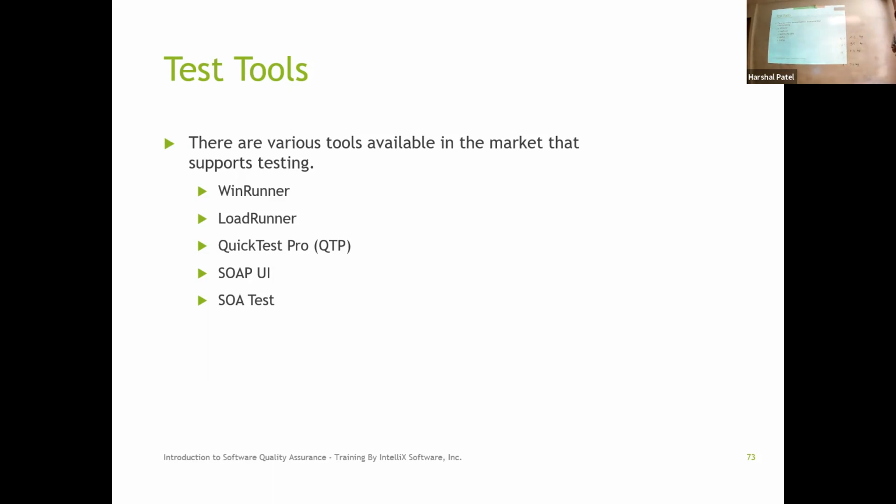Think of it, anytime somebody asks you to guess, your first reaction is, let me understand what all I'm supposed to do. And when you do it, you essentially break it down into 2 factors. One is, irrespective of how big the work is, this thing remains the same. And then depending on how many widgets, there's a variable part.